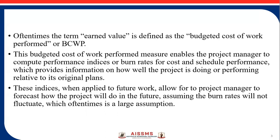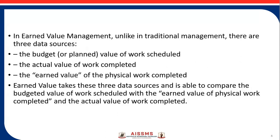Obviously that is a large assumption — that these particular rates will not fluctuate — but in actuality they may fluctuate and there are more chances of that. So in earned value management, unlike traditional management, there are three data sources which we are going to use. The first data source or value is the budget — that is the planned value of the work scheduled.